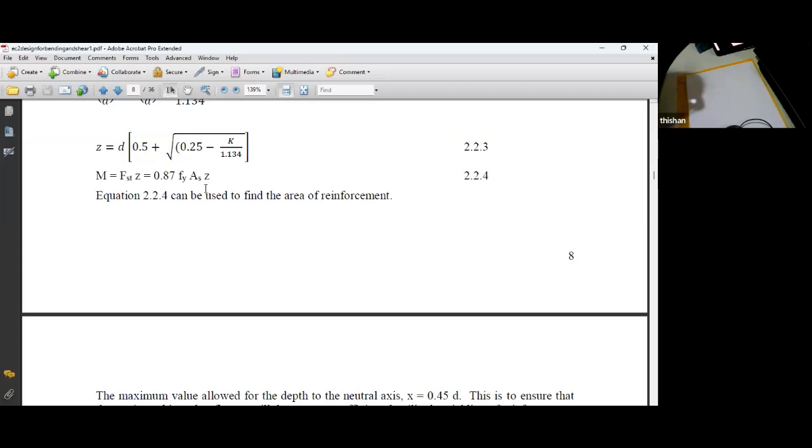So 5,000, 80% is 4,000, saving is 1,000. Out of that, half belongs to the client, so the client gets a saving of 500 million.